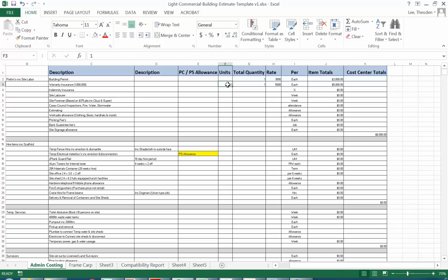No, well, the schedule will be done whether you're doing the project management or not, whether you're acting as a builder or not, and so that's specifying the products that you want for the design, whereas this is done purely for pricing. This should include those things. Of course, yes, absolutely. So the schedule will have some more detailed information, but it may not have the costing. You don't always need the cost on the schedule. It's just specifying.